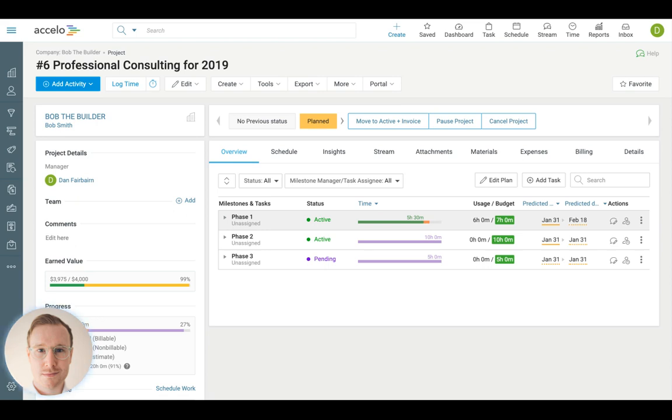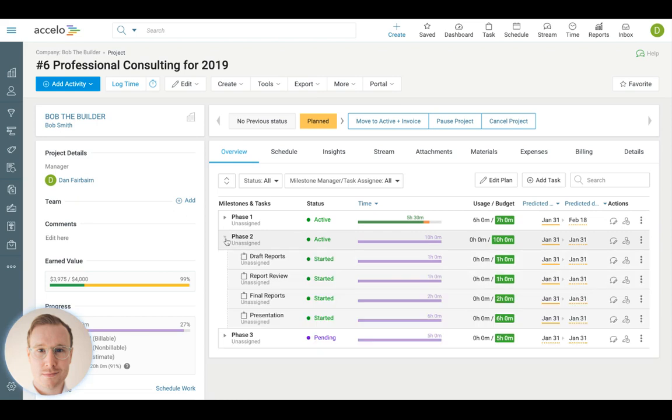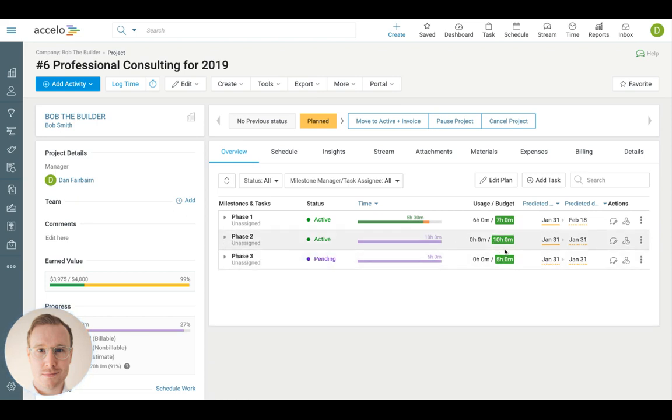So that's telling us if I was to bill actuals for this project, what I mean by that is bill only for the work and the exact value of that actual time that I have done so far, it would be working off the 5 hours and 30. Comparing that to the budgeted values here, each one of these milestones and the tasks within it have budgeted ideals of how long that should take. Now, of course, a lot of projects especially are built out on budgeted value. This is just there for a benchmark of whether that time exceeds or whether you've met budget correctly.